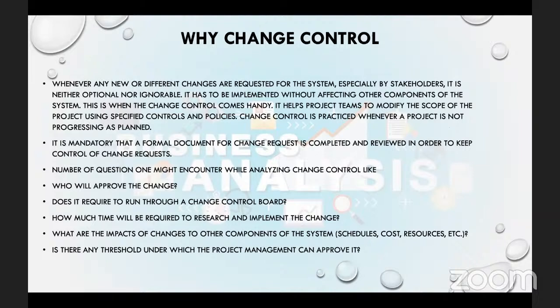When we're asking for more time, or we're adding new features, or we're changing our approach, definitely something's going to happen to our timeline, right? Our schedule. So the project can be prolonged. We will need additional budget because time is money. Someone has to approve all these things for us. This is why the change management process is very important.